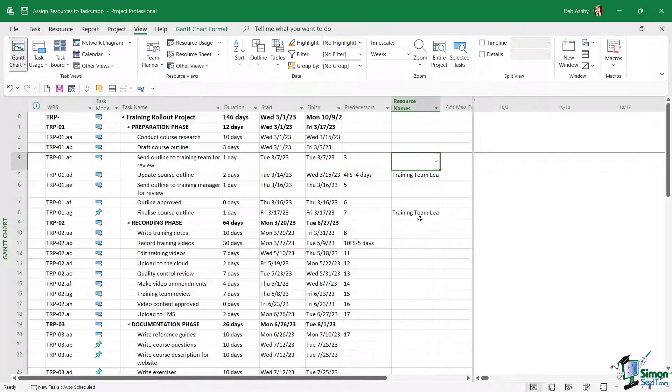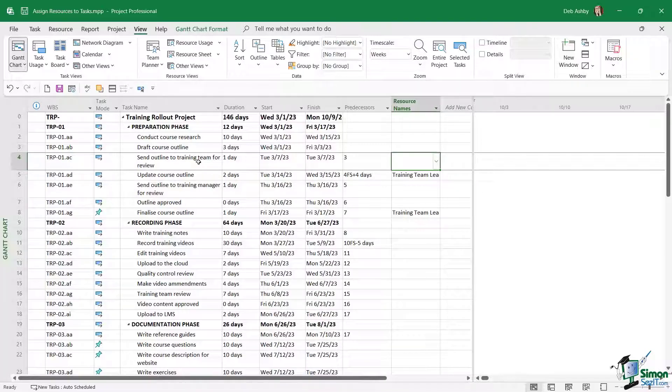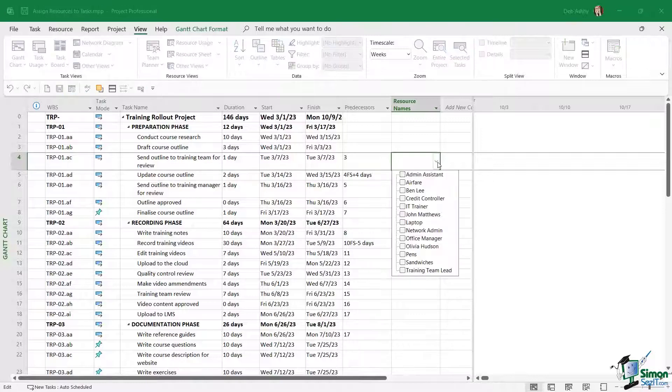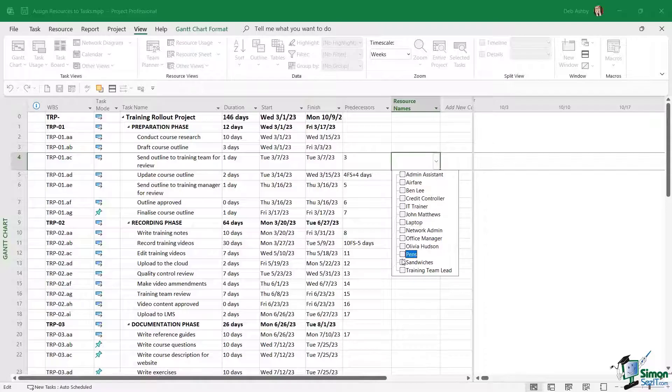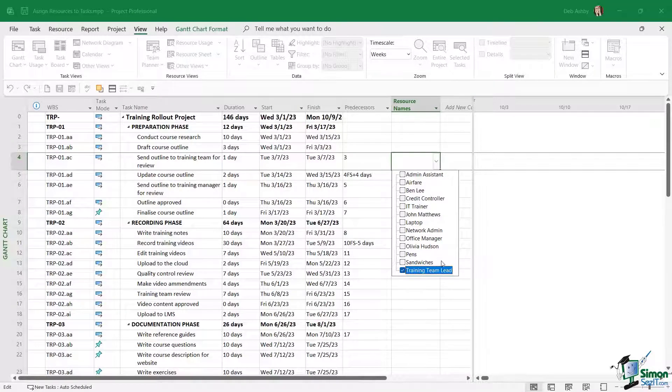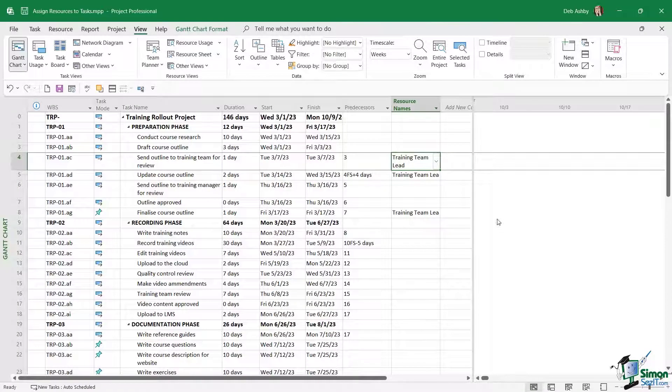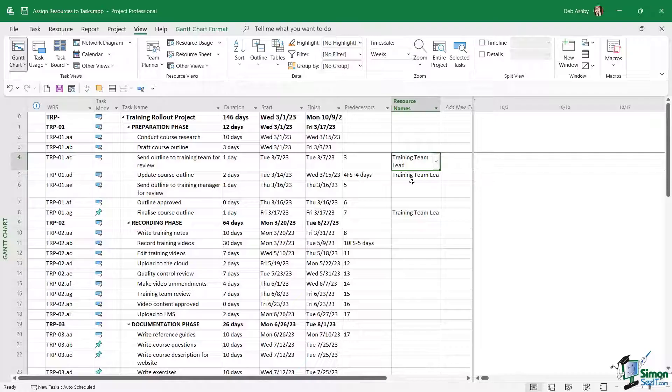If we take a look at task number four here, 'send outline to training team for review,' that's going to be a task that is completed by the training team lead. So all we need to do is click the drop-down arrow in the resource names and we can see all of our resources just here. I can select training team lead, and if I wanted to I can select more than one. Click away, and that is one way to assign a resource to a task. Really straightforward.